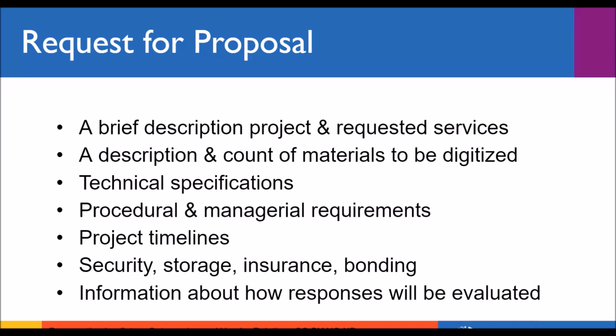In Northeast Document Conservation Center, or NEDCC's preservation leaflet on outsourcing and vendor relations, Robin Dale lists the elements to include in an RFP. An RFP should include a brief description of the nature of the project and services being outsourced, a description of the nature of materials the vendor will receive. Are they getting documents or audio tapes? What are they receiving? Any sort of technical specifications that you have in mind.